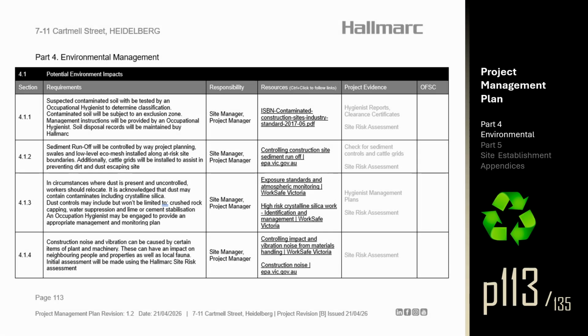Part 4. Environmental Management. Section 4.1. Potential environmental impacts. Section 4.1.1. Suspected contaminated soil will be tested by an occupational hygienist to determine classification. Contaminated soil will be subject to an exclusion zone. Management instructions will be provided by an occupational hygienist. Soil disposal records will be maintained by Hallmarc.